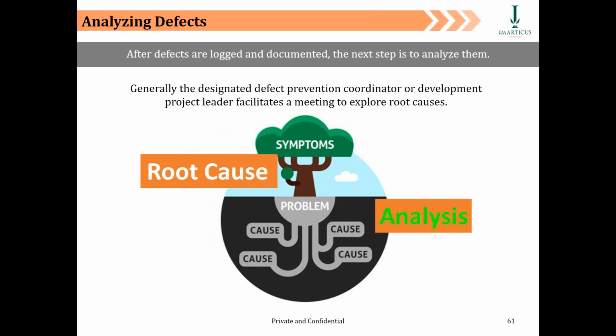So there's a category of error, right? We got errors in configuration, we got errors in coding, testing, programming, etc. So these guys are going to make the analysis themselves, come back to you, and give you a small Excel as a report. What does the report say? Number one, what are the symptoms they notice from the recurring problems? Number two, what seems to be the problem? Third, what seems to be causing that problem? Fourth, what is the analysis?